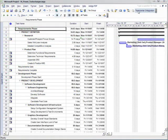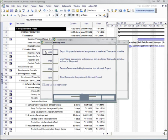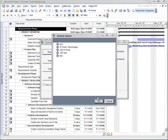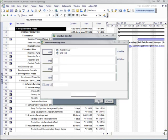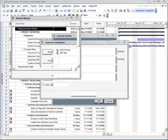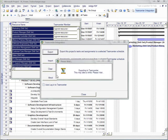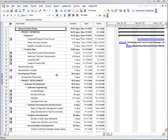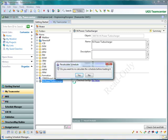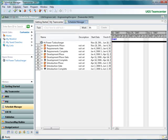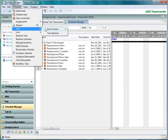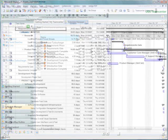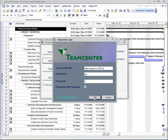Teamcenter's tight integration with Microsoft Project enables project management teams to use the right tool for their work by allowing projects to be imported and exported to and from Teamcenter. Using the simple drag-and-drop feature of the Teamcenter user interface, imported projects can be reviewed and modified directly within the Teamcenter Schedule Manager. New tasks can be added and imported tasks can be edited or assigned to resources within the managed Teamcenter environment. The bi-directional nature of Teamcenter's integration with Microsoft Project allows users to import the managed project information back into Microsoft Project with confidence that they have the most up-to-date project information available.